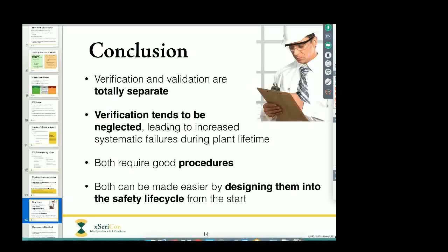Both are important, but validation people tend to be fully aware of, and that usually does get done to some extent. Verification, I'm afraid, is usually skipped and ignored. And I think this is a problem, because it's a great opportunity to catch errors that might remain hidden in the system for years and years, or even show up later in the life cycle, for example during the implementation phase, when it's going to be much more expensive to resolve them than if they had been fixed earlier on.